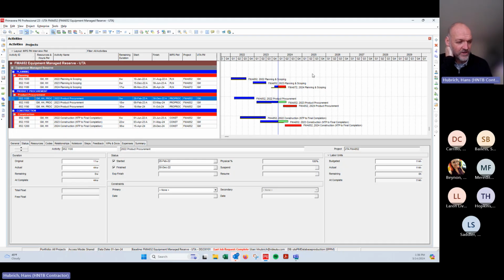And my interpretation of that, Stephen, is that it was just more useful to have a closer comparison and to be able to talk to it frequently and say what happened from last time we talked until this time we talked, as opposed to the original baseline for that activity whenever it was created, which might have been a year ago, and isn't as valuable to talk to in comparison's sake, because lots of things can happen in a year's time on this project.